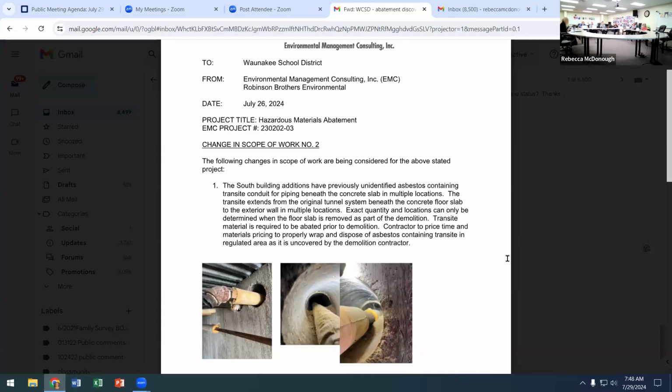From a schedule perspective with both of them, the first change order, even though it's in the north phase of work, abatement comes through and then demolition follows, and we're right behind them with the new construction. I think you said you have about 2 weeks of work for that mount ceiling. They're going to try to get it done a little quicker. So both of these, we need them to proceed. I think you asked for, hoping to start this week, just to keep the flow of work going so it doesn't slow up everyone behind them. If we get the approvals, this work can be done in sequence and not have an impact on the schedule.